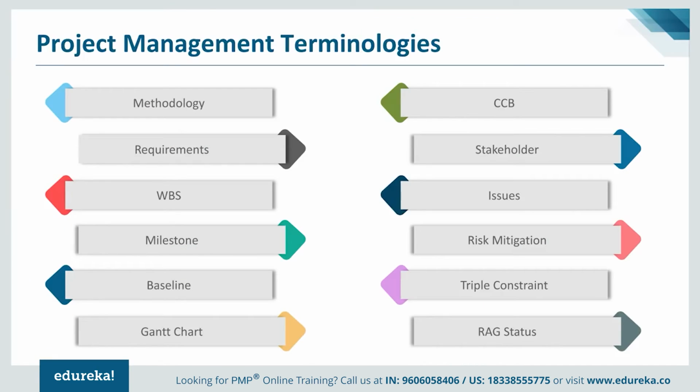Another topic is CCB, which is Change Control Board. I mentioned to you about requirements gathering and baselining. The Change Control Board will come into the picture whenever anything you're doing is beyond the baseline. So if a requirement is baselined and now a change is introduced in the project, then it has to go through a change control board. In the change control board, you will have various stakeholders. Of course, you'll have a project sponsor, a requester of the change, and representation from the IT side as well.